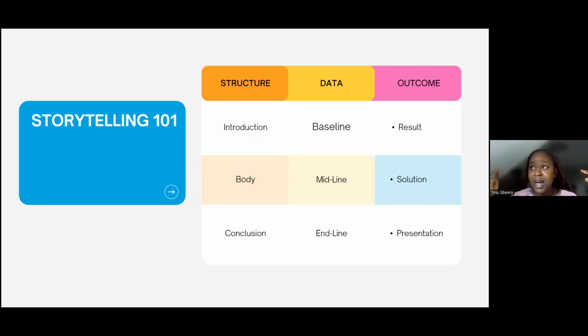We just say, okay, they are giving 5,000 USD. Write the budget to reflect 4,889 USD. Then the remaining money, you just put it as miscellaneous. That's not necessarily the way to write a budget, right? It's always good to have an actual budget and give room for 20 or 10% inflation of the actual budget that you have written. Whatever remains from that, you can add to the miscellaneous and put it down to balance out the numbers, if that is what you want to do. Or if you do that and your budget is still within the 4,000 USD plus and you're getting a 5,000 USD grant, it's still better for you.